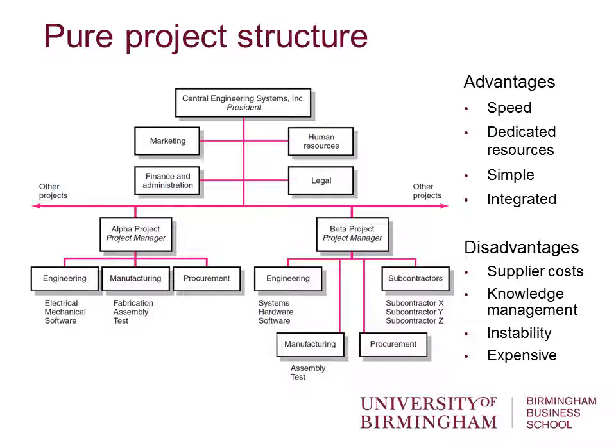They also don't have a great deal of stability. This type of organisation is only as good as its next project, and if suddenly the project stream dries up, the organisation's gone. Okay. It's also relatively expensive. So you have a lot of overhead built in within the projects themselves. So although the overhead's not within the owning organisation, the project organisation, it is within the projects themselves.